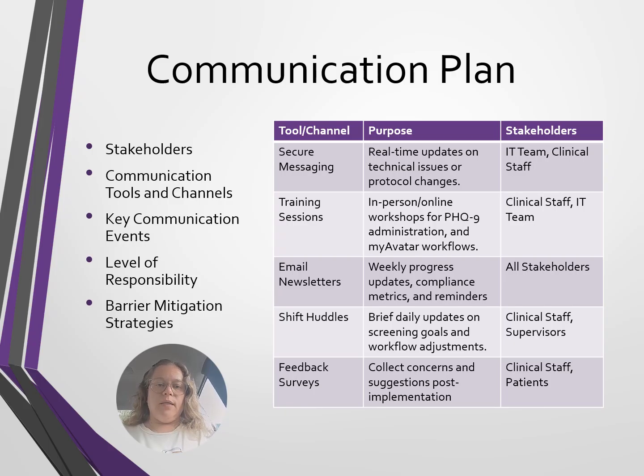Next, an IT team is needed. Their role is to integrate PHQ-9 into My Avatar, troubleshoot technical difficulties, and ensure data security. The information they need are technical specifications, testing timelines, and user feedback. Also, we need administrative leadership. Their role is to allocate resources, monitor compliance, and approve policy changes. The information they need are progress reports, budget updates, and compliance metrics.